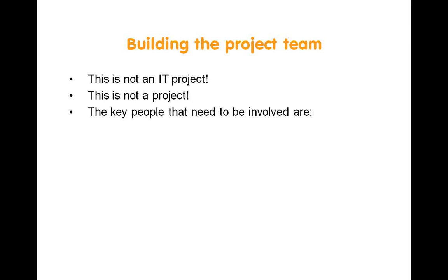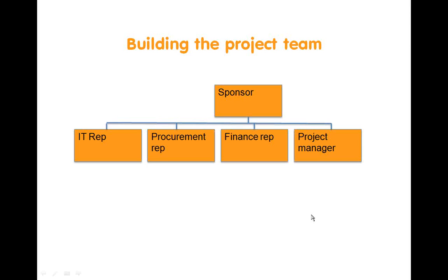Okay, again, we still haven't gone to the market yet. This is still stuff to be done internally around the prep side. As far as the project team is concerned, this is not an IT project. IT is involved, but only for a very short period of time. And actually, it's not a project, it's a program. And the key people that really need to be involved to make sure that this is going to be successful: it's key to have a high-level sponsor that backs you every step of the way and gets it, and they will not let this project be undermined at all.